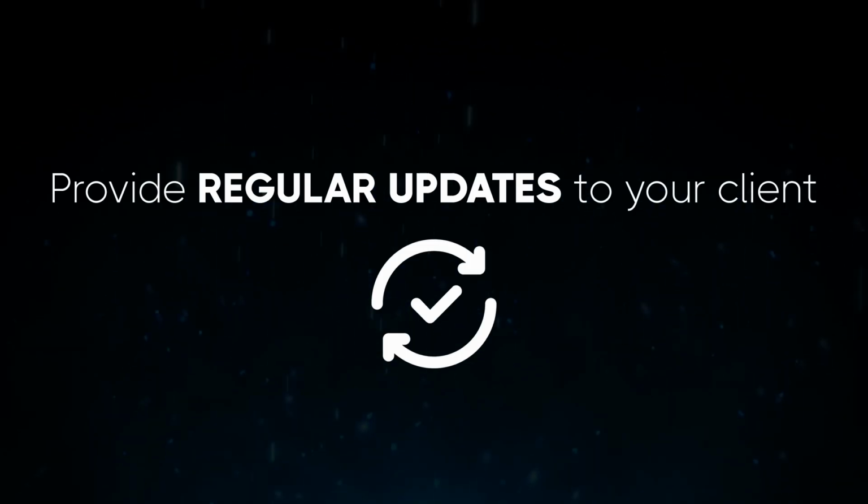Step number 8, provide regular updates to your client. Ideally, it will be at least on a weekly basis. Like at the end of the week, you send an email, you send a communication, and it includes what progress was done, are we on schedule, are we ahead of schedule, do we need 2 days to recover and get back on schedule because of X, Y, and Z